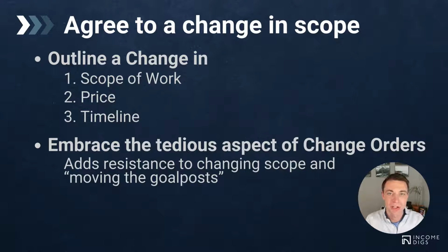We have to assume a certain amount of change orders, but we want to create some barrier, a little bit of resistance. Usually price is like the only one we think about. I want to introduce the idea that we physically have to sign it, we have to document it. That tedious aspect of it might make customers not want to do that many of them.